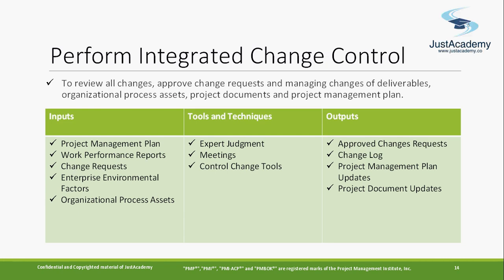Now the next one. This is a very important topic from this chapter, perform integrated change control, because they ask one or two questions from this. Sometimes students get confused about what has to go through perform integrated change control. One of the basic things you should remember: any new changes, small changes, big changes, any new requirement asked in the project, has to go through perform integrated change control.